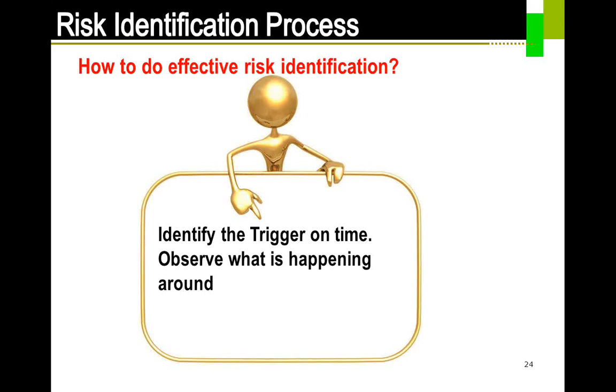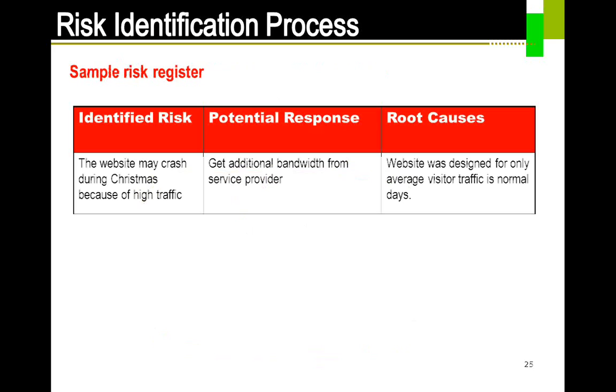It might so happen that one of the team members went on sudden leave, and then it slipped. But that's the trigger. It might also so happen that the team member's absence might even lead to attrition, because the team member has been working very rigorously for the last 16 weeks, and suddenly that week he realized that it's not worth it for him to work on this particular project. So what I mean by trigger is you need to identify that something suddenly went wrong, and then the corrective step needs to be taken as soon as possible.